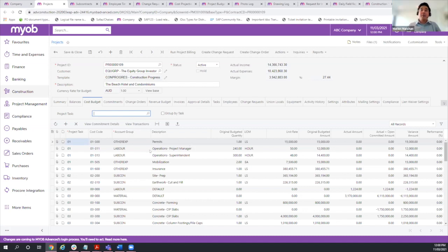And then you can define what sort of expense that is too. And the great thing about this setup that we have, called account group, is it's tagged to the specific account. What tends to happen with construction companies is someone delivers some materials on site, or a subcontractor finishes the work and gets sign off, and the person in the field will have to call the office to get it tagged to the correct code and the correct account.